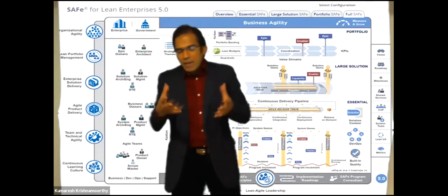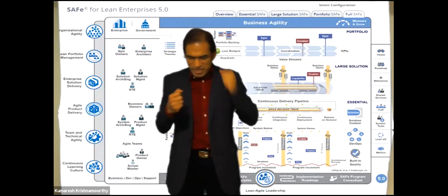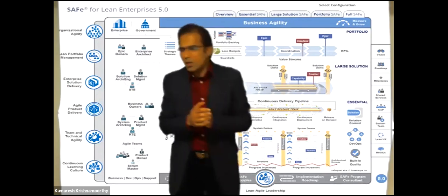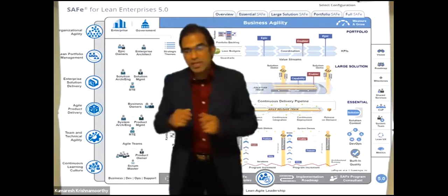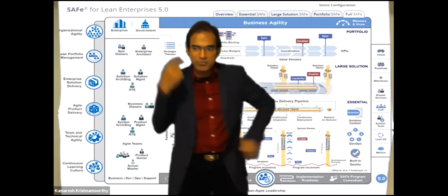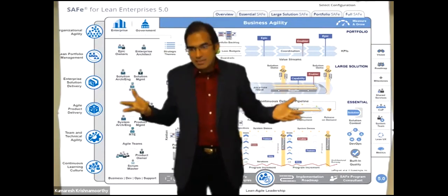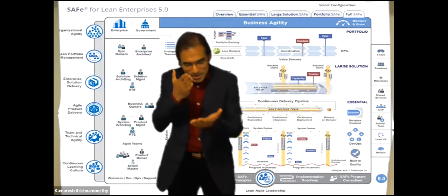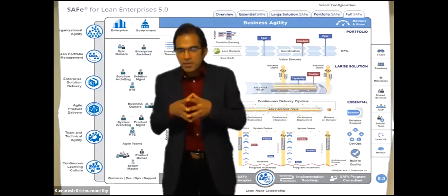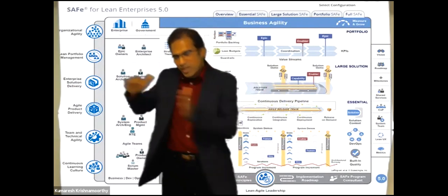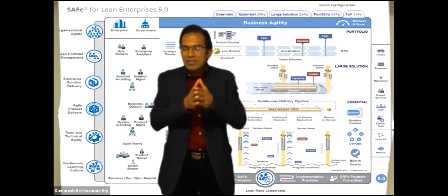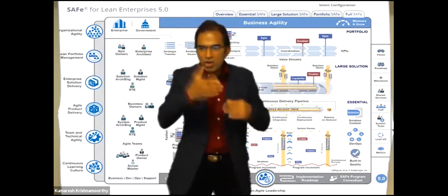But the teams are very excited, very enthusiastic, and when they are doing it, they soon realize that the environment is not ready yet, so they cannot deploy the code. The database is not there, or it has some configuration issues, or maybe they don't have data yet. These are some of the challenges they face. So if the architectural runway is not there, then work cannot proceed. There are a lot of bottlenecks.